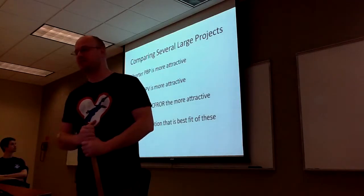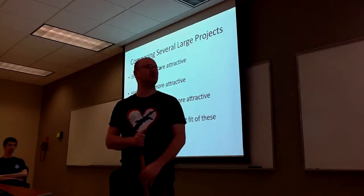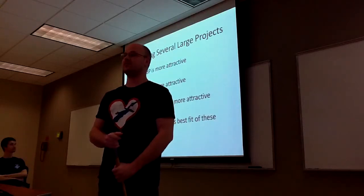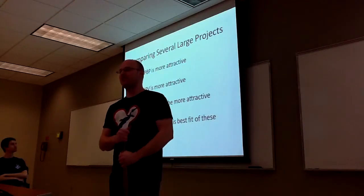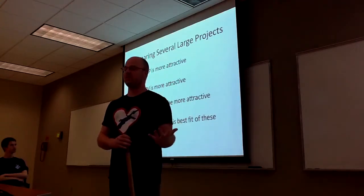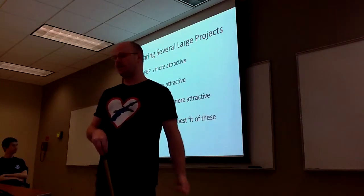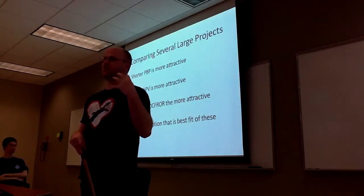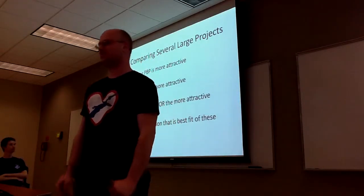If you're comparing several large projects, a shorter payback period is more attractive — you want the shortest payback period possible. A higher net present value is also more attractive; you want the project with the highest net present value. The higher your discounted cash flow rate of return, the more attractive the prospect. You want to calculate your net present value and then establish your discounted cash flow rate of return — the highest net present value with the lowest DCF-ROR is your best choice.